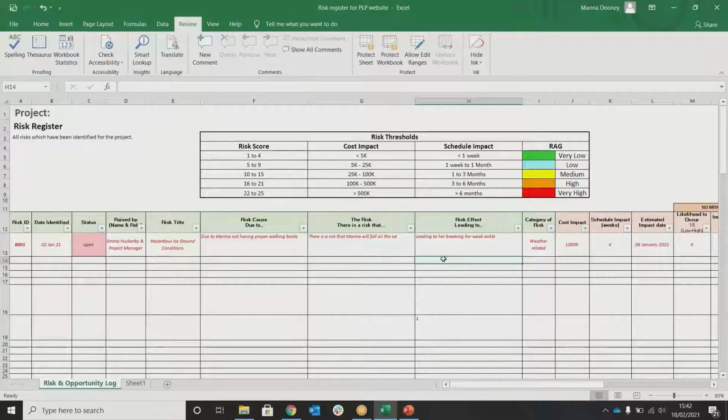So if producing a risk dashboard, you can filter the RAG status column, and you can present it in any sort of dashboard. You can do your top 5 risks. You can have a heat map. People who are familiar with risk management within projects will understand what a heat map is. It's basically explanatory and goes on the colours: red, very hot; blue, green, very cold, not active on the risk register. So this whole register can be utilized to create dashboards for other people to see what your risk profile is about.